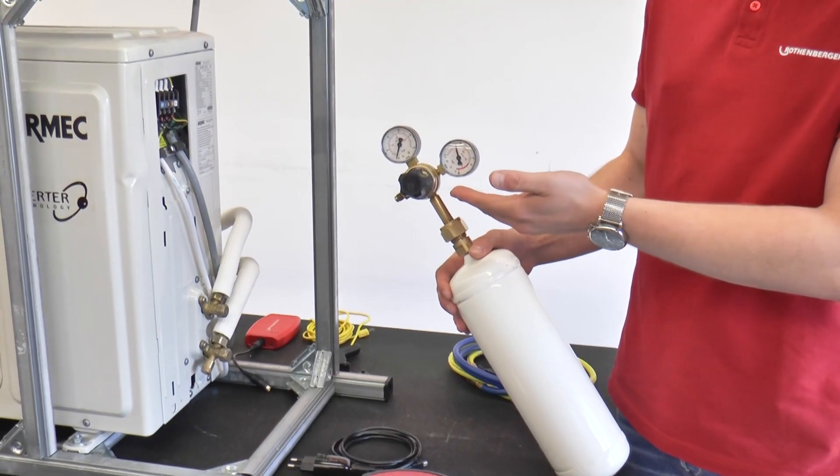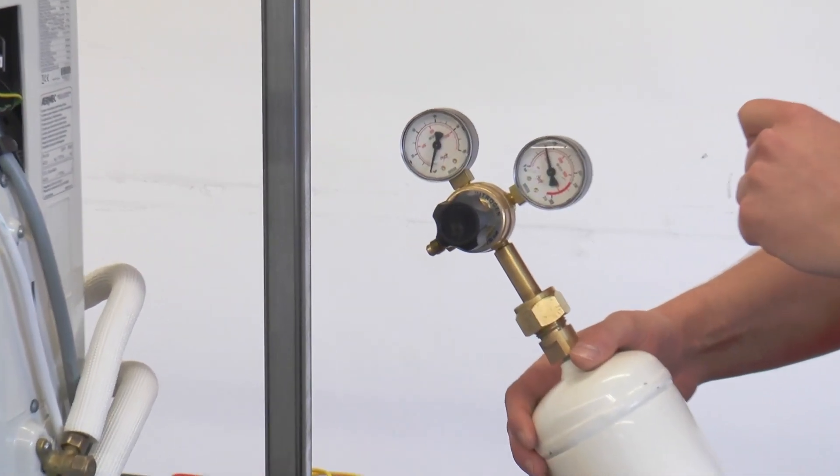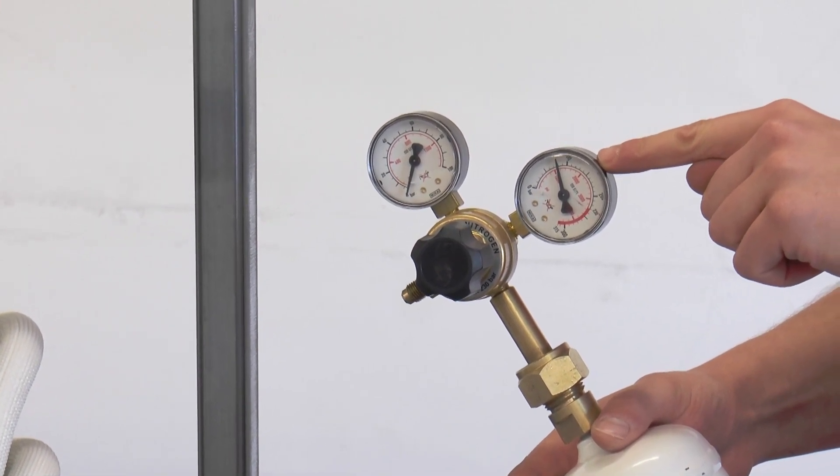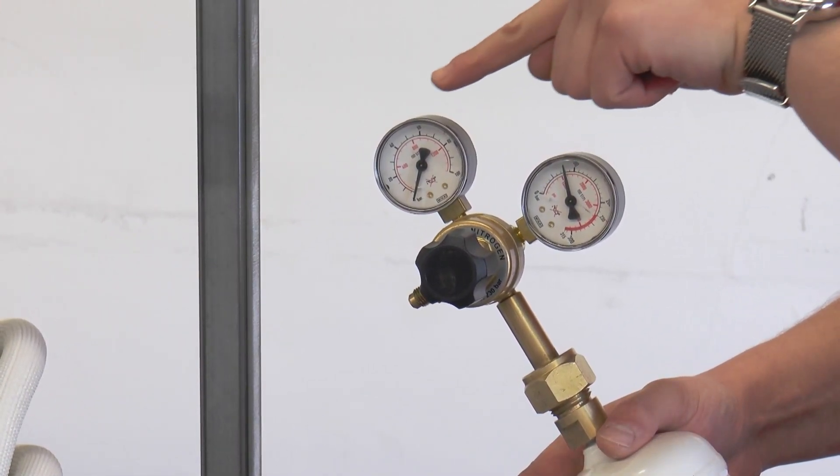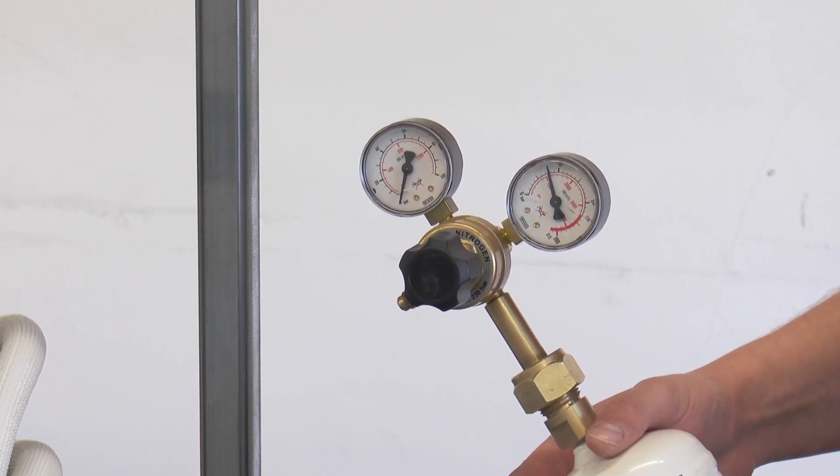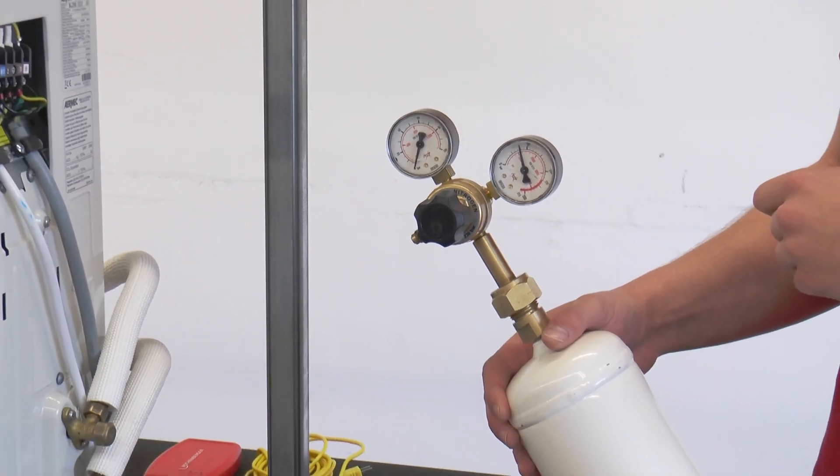A pressure reducer is connected to the nitrogen cylinder. The pressure reducer is equipped with two pressure gauges. The pressure gauge facing the cylinder indicates the cylinder pressure. Working pressure is indicated on the manometer that stands out. In refrigeration technology only dry nitrogen with a quality class of at least 4.6 is used.